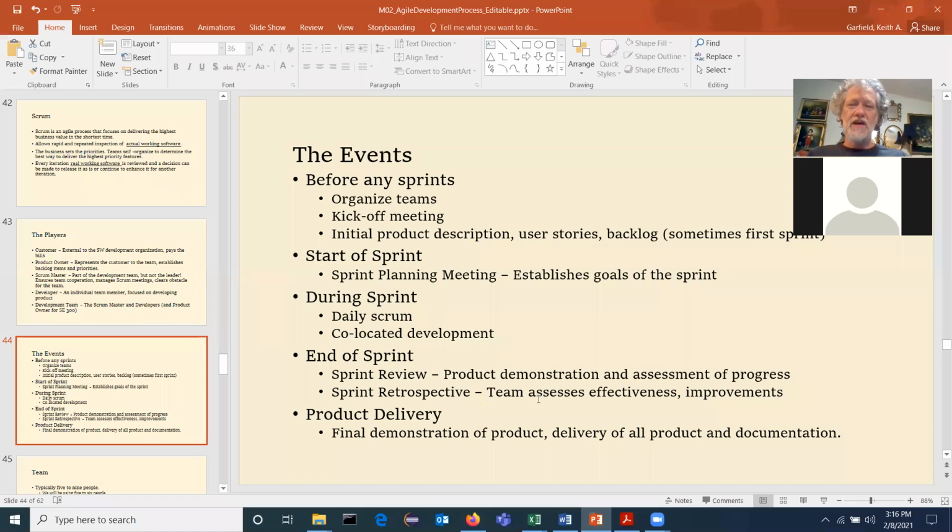So you take advantage of that notion of time boxing, and I've recommended time boxes for different events as I'm putting up these assignments. Your sprint meeting should be 15 minutes max. With 4 people, it's probably a 10-minute meeting. You literally walk in and say, okay, this is what I did yesterday. This is what I'm going to do today. And this is the problem that I'm going to have getting it done.